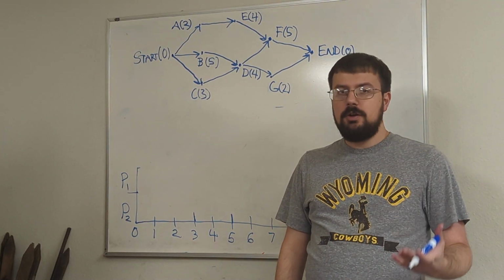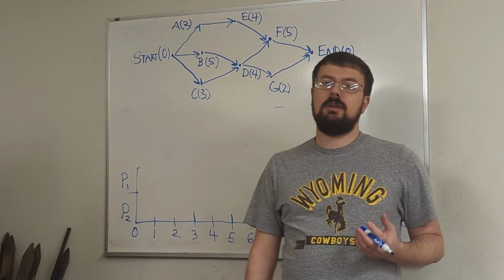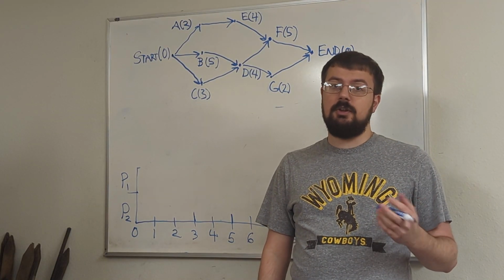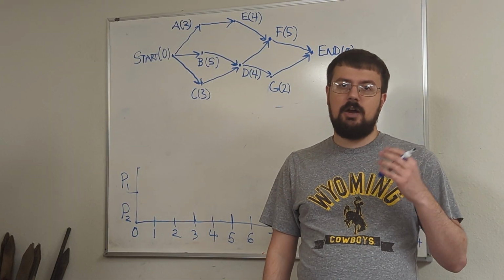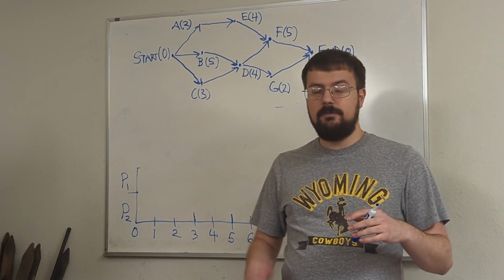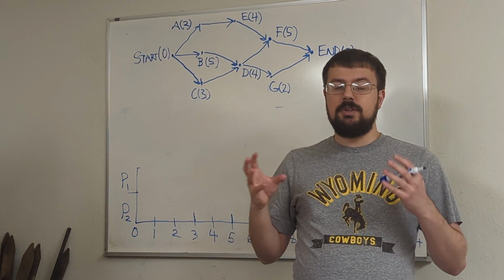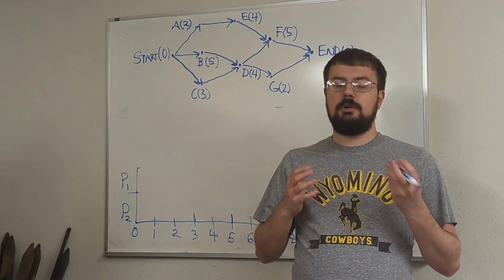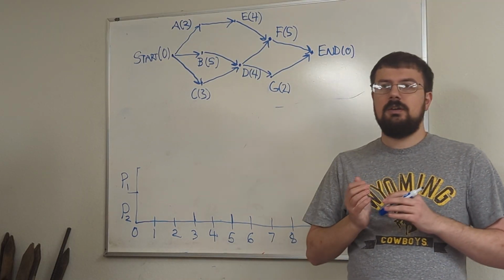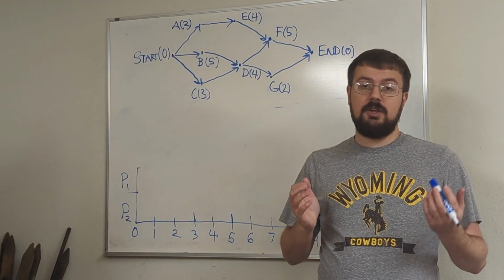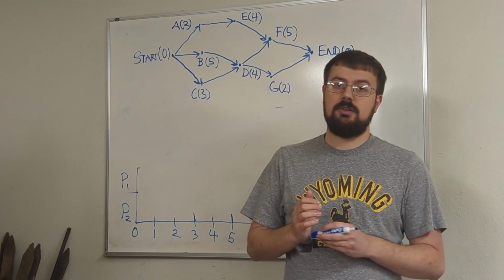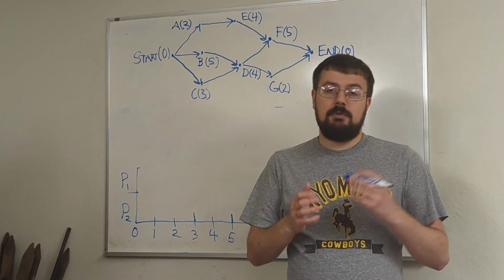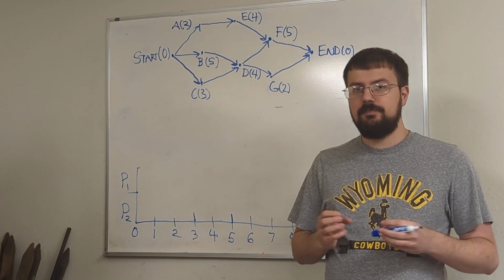And when we are using the critical path algorithm, the first step is to figure out the critical path for the project using what is known as the backflow algorithm. This allows us to calculate the critical path and the critical time for the project. And then we use the information that we get from the backflow algorithm to create a priority list. The critical path algorithm is usually really one of the best algorithms for solving scheduling problems because it relies on this concept of the critical path.